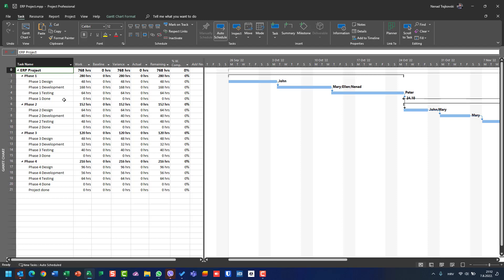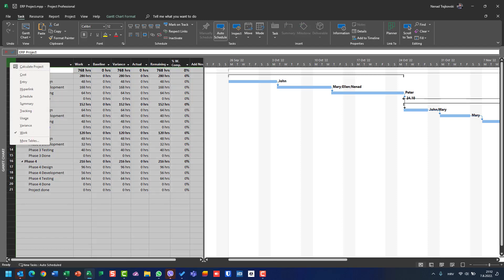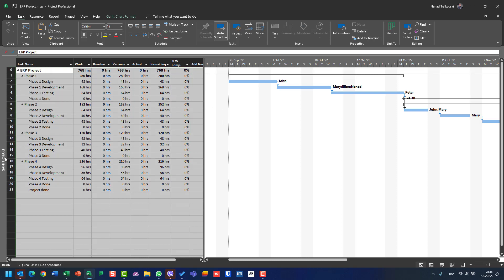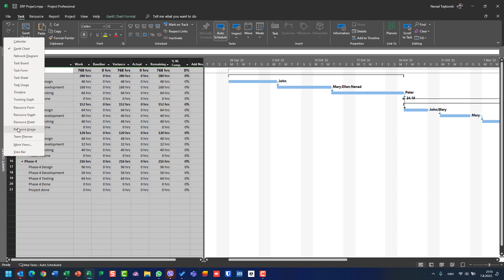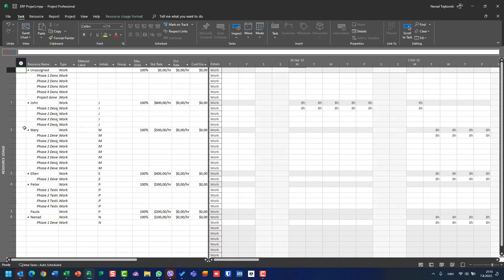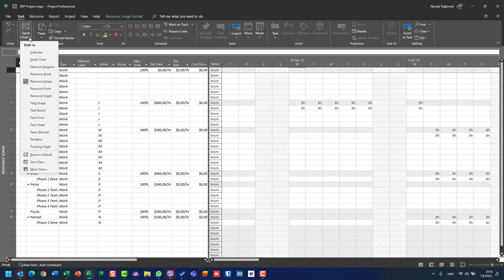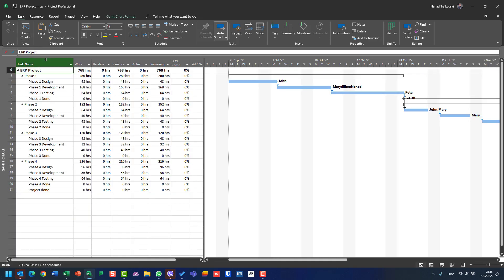I have chosen the Work table in Gantt Chart. If I now switch to Resource Usage view, I will still be on the Entry table. Why? Because when you change a table in a view, it applies only to the view you are currently looking at.